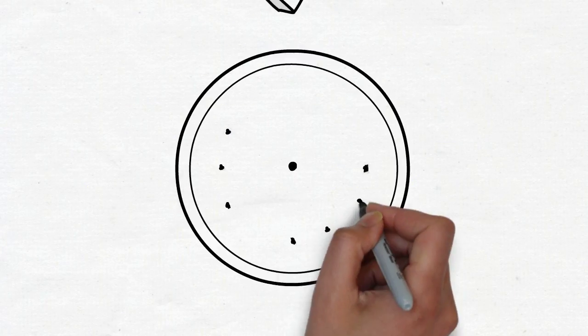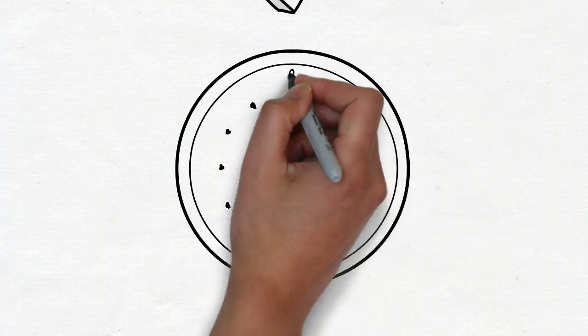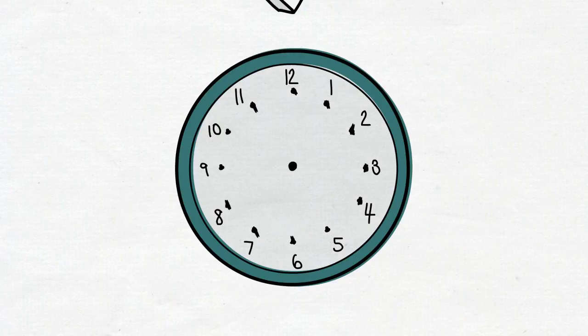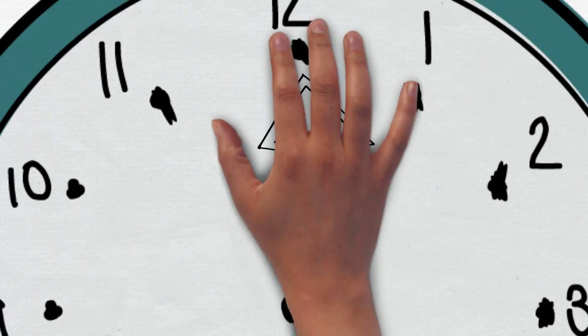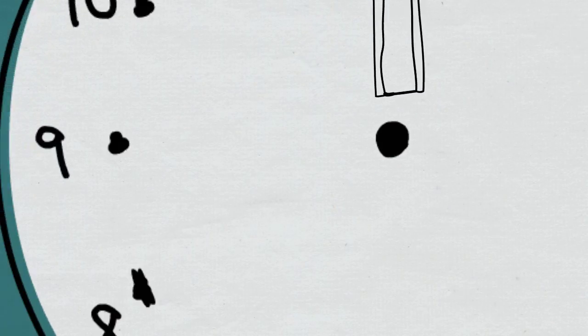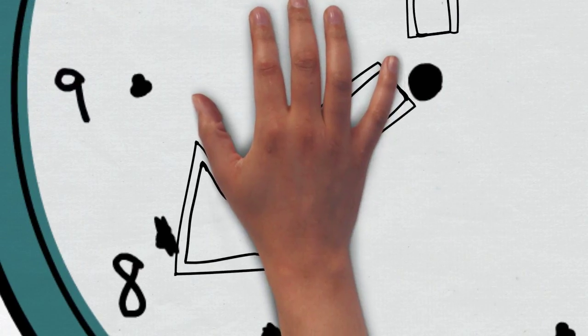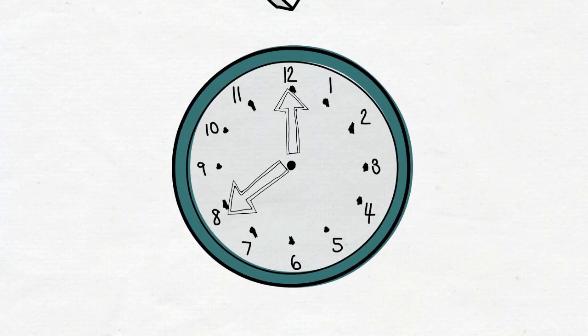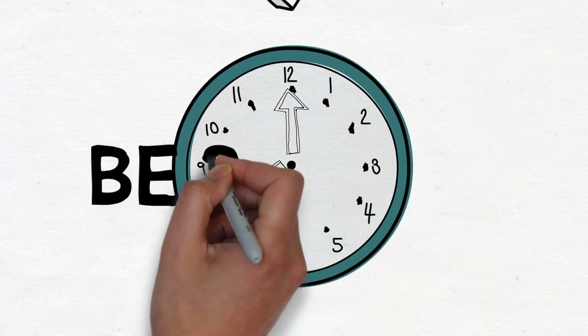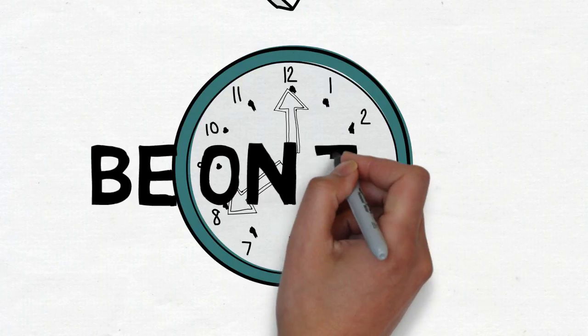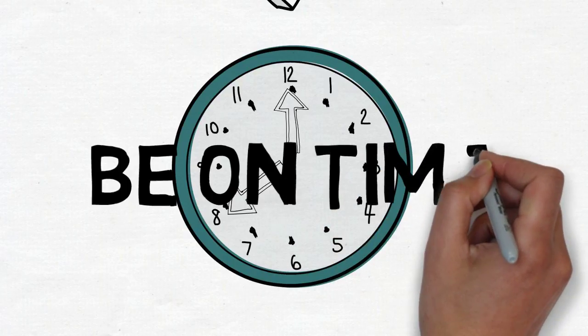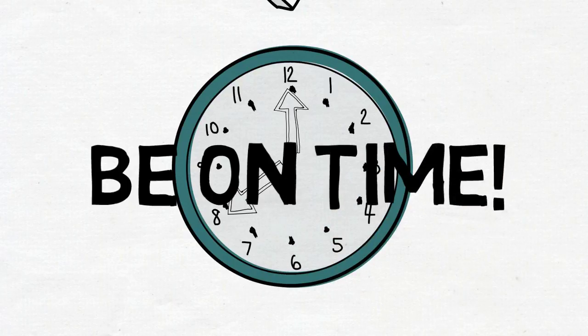Time cards must be received in the office by 8 a.m. on Monday morning. At that point, they are reviewed by a branch expediter or administrator and then signed off by the respective project manager, prior to inputting it into our accounting system. If the time cards are not received by Monday at 8 a.m., it's possible employees won't have their time entered correctly.